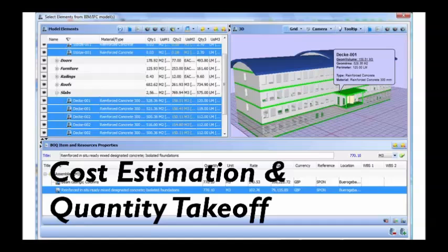And at the design development stage, it's actually helpful to see this, because if you look through the list and you see one that seems extremely large, it could be something that as the architect or engineer you might not have thought was a really expensive material, but for whatever reason it's currently running more expensive than normal.